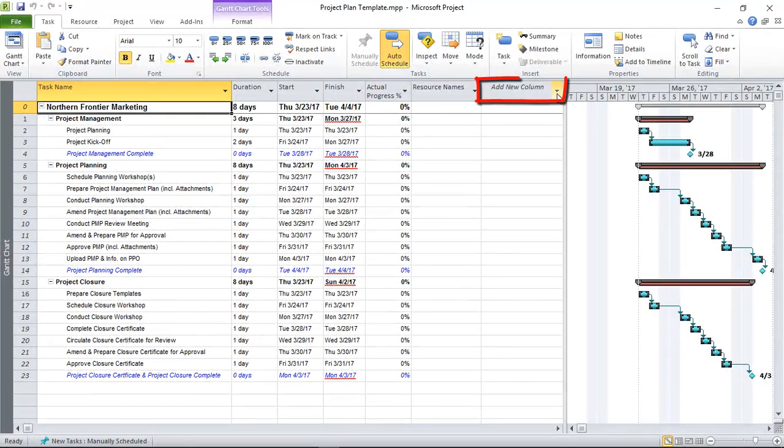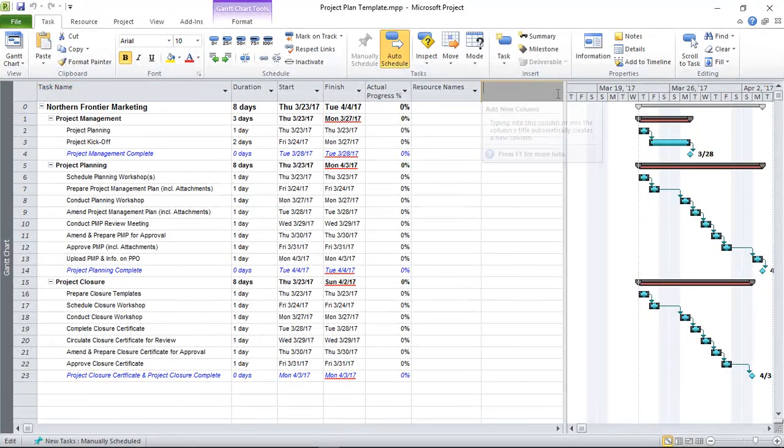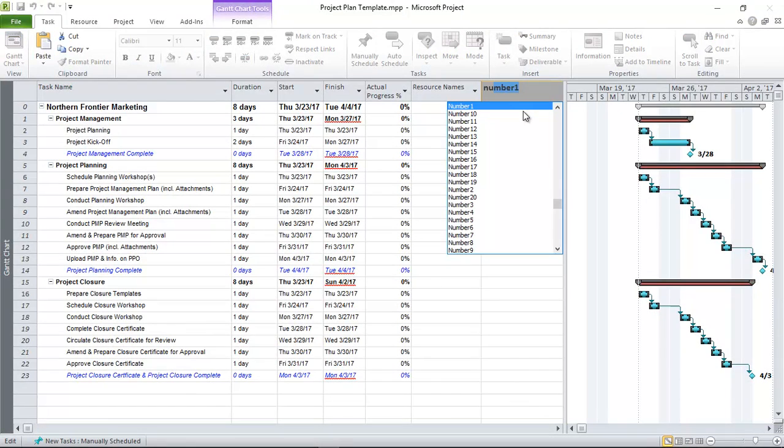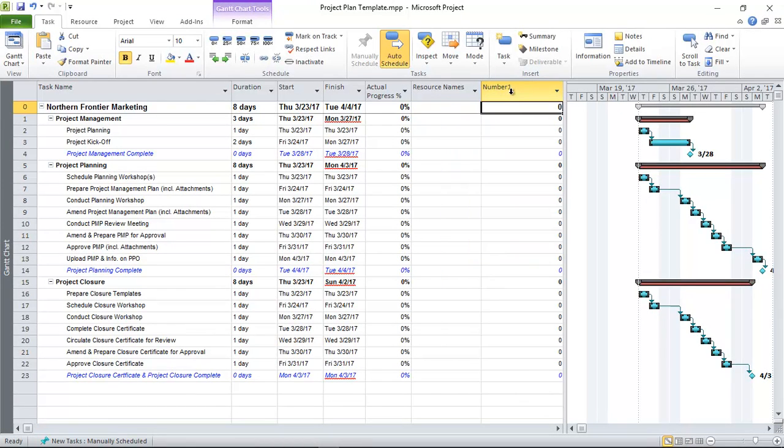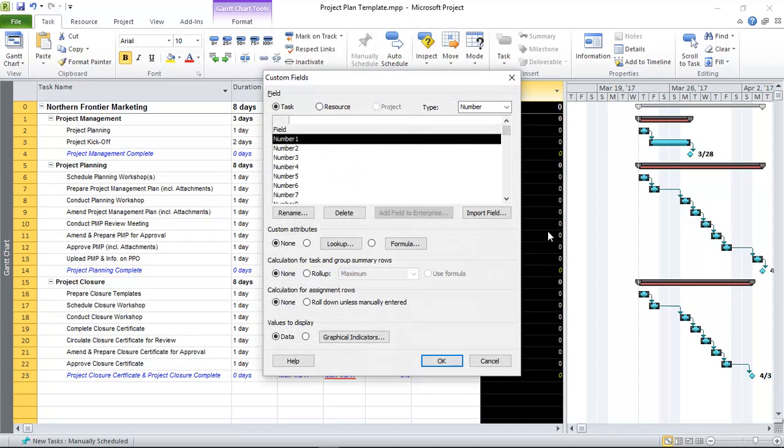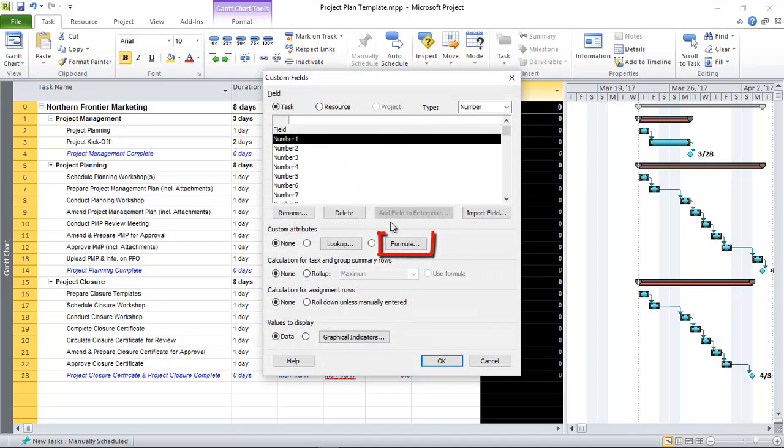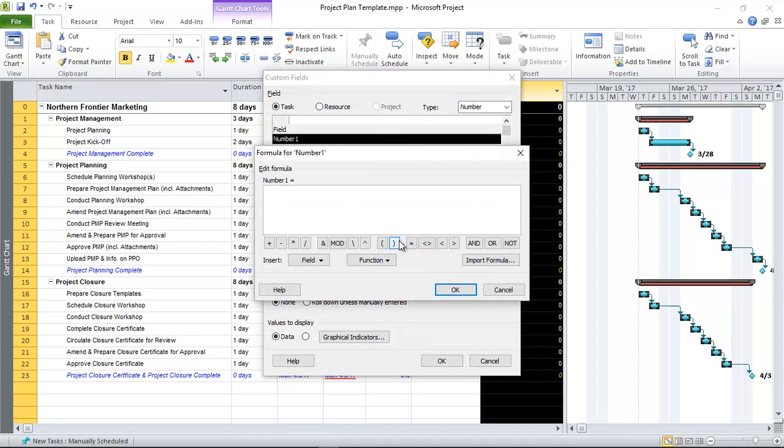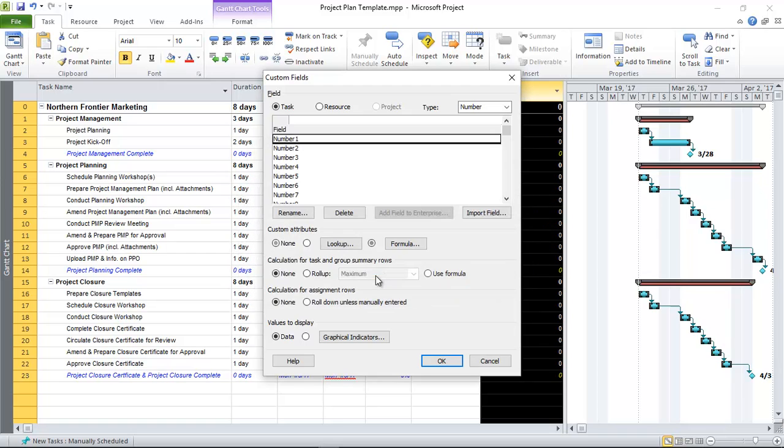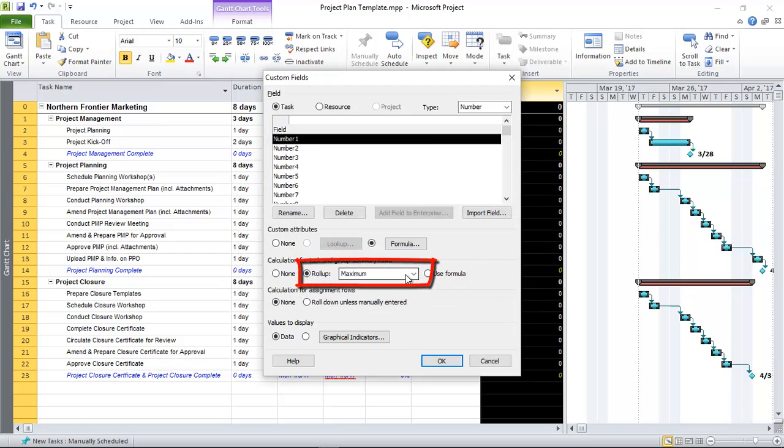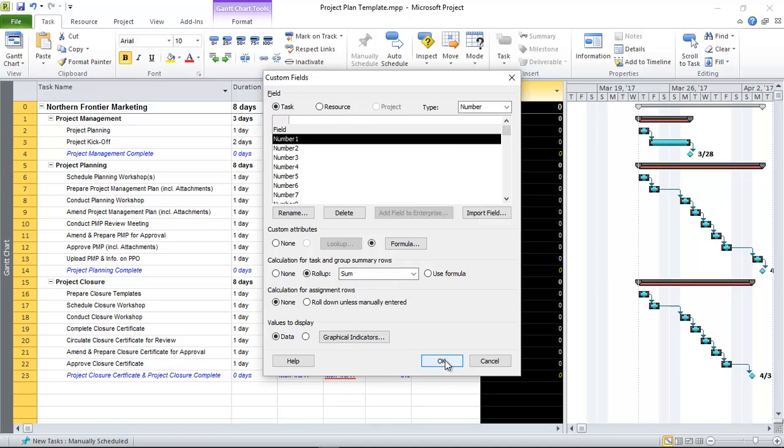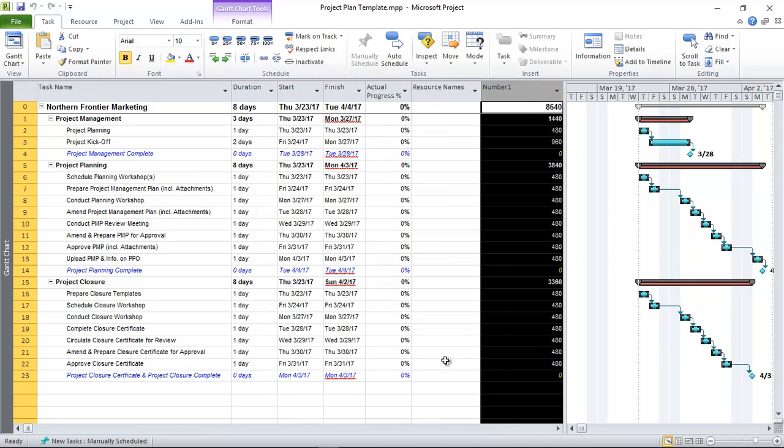So here it says add new column. I'm going to add the number one field, then I'm going to right click on here, select custom fields, then here where it says formula I'm going to paste that formula. So okay, and here where it says roll up I'm going to choose sum and then click okay. Then you'll see some of these numbers changing.